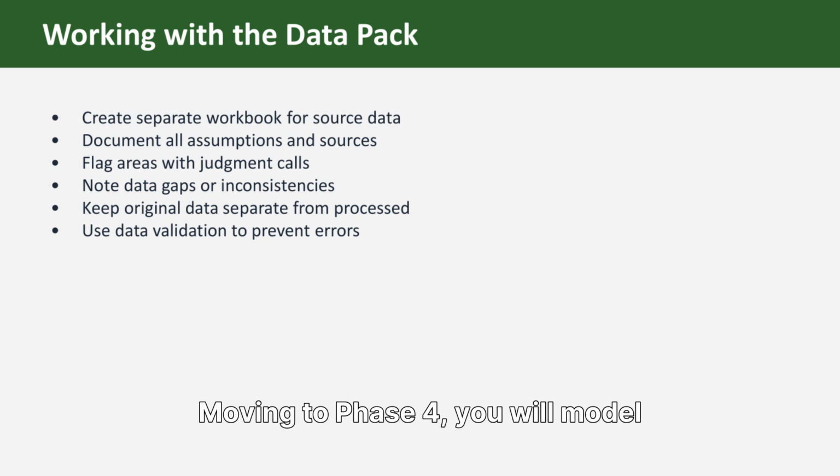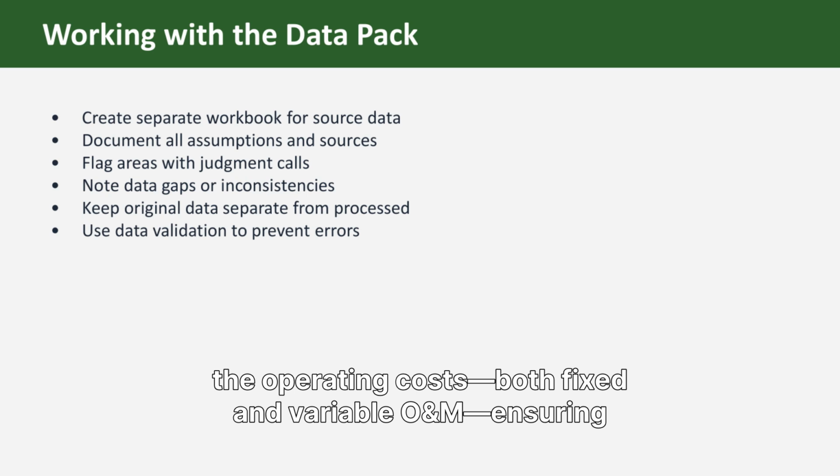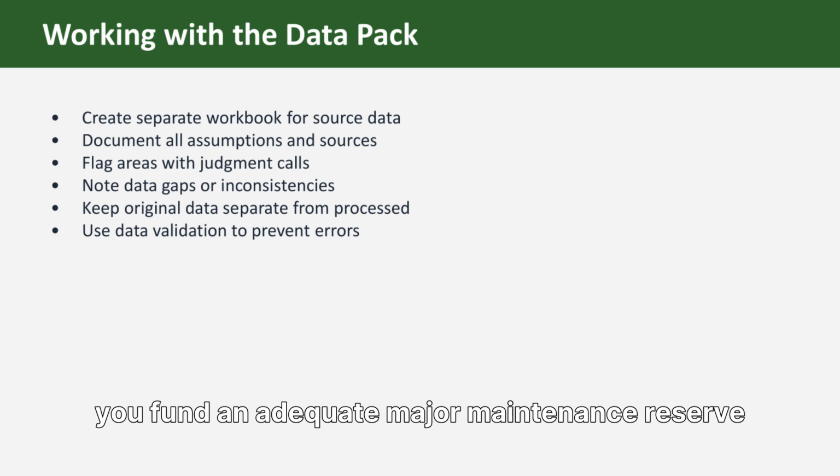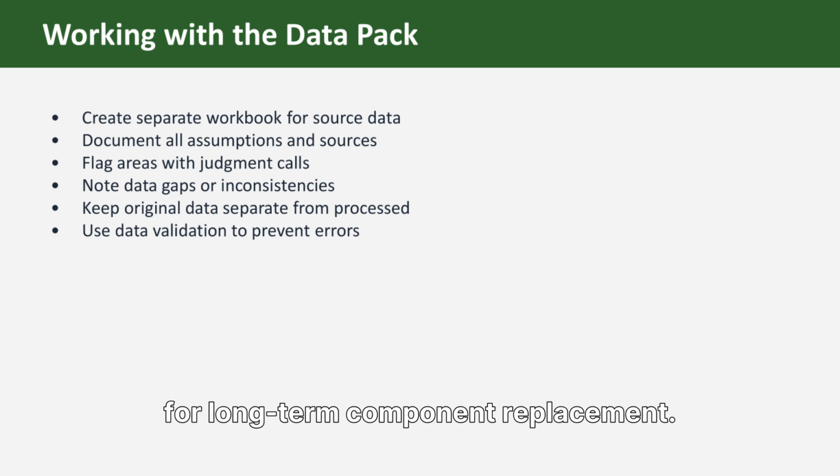Moving to Phase 4, you will model the operating costs, both fixed and variable O&M, ensuring you fund an adequate major maintenance reserve for long-term component replacement.